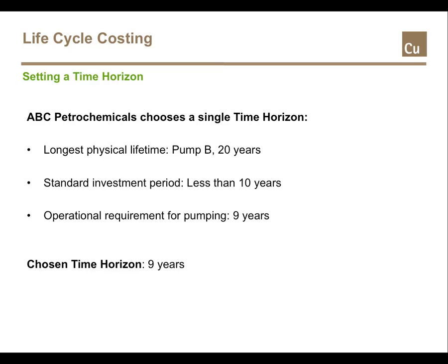The problem of replacing the old pumping system after 10 years has lost its relevance, but maybe he should correct the salvage value of alternatives A and B, since they would not be even halfway through their lifetime at the end of the time horizon.